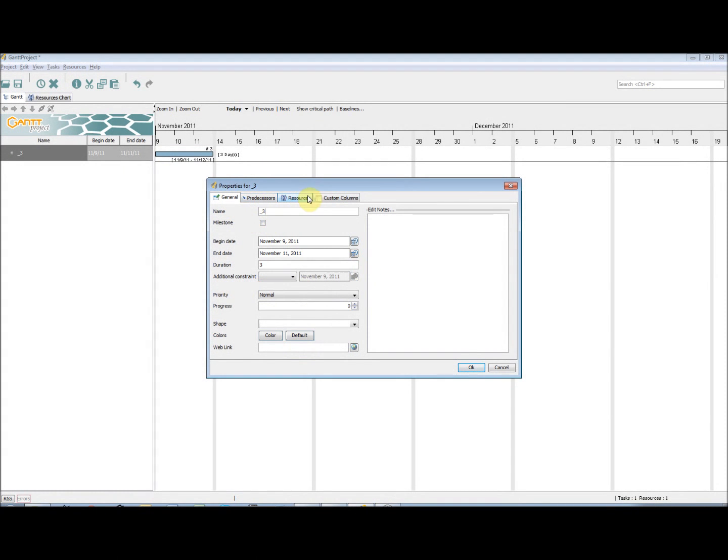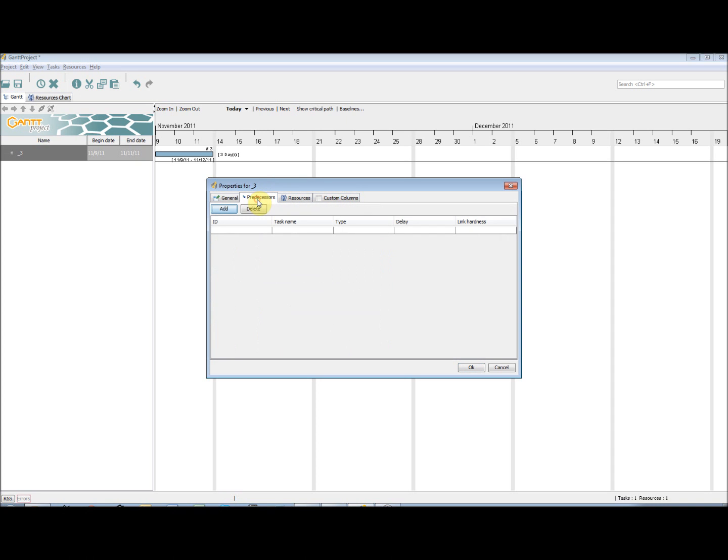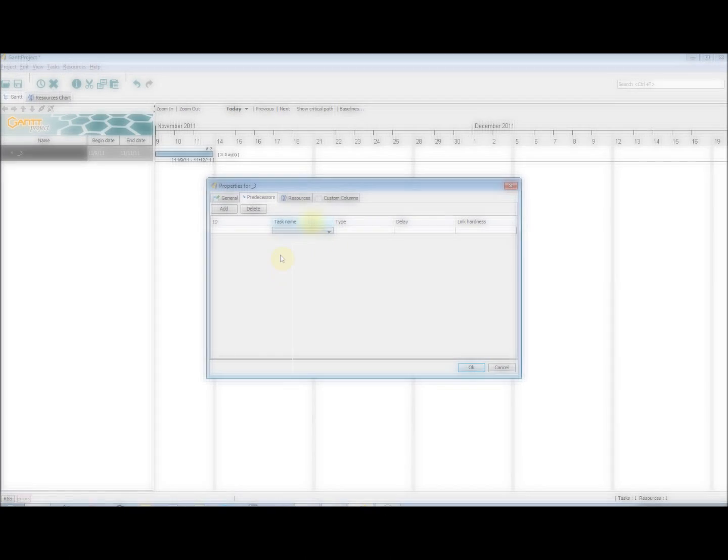You will notice across the top of the window, there are a number of tabs. If we click on Predecessor, we are able to add tasks that are required to be completed before this task can start. We do this by clicking Add, and then by selecting in the drop-down box the task that is required to have been completed.